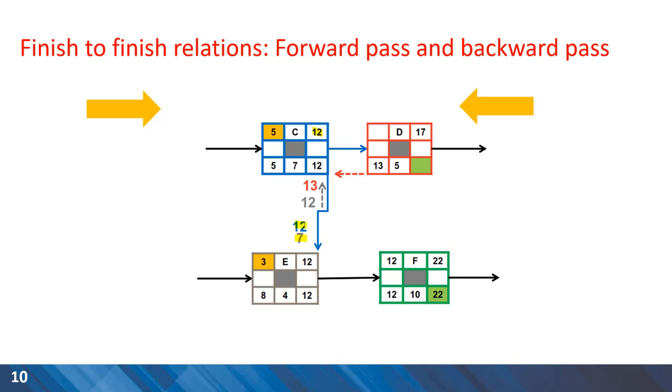Another option that we have is coming from activity C. So early finish time of 12 is our second option for activity E. Because we are in the forward pass, the longest date is accepted. So 12 will be the early finish time for activity E. Again, I encourage you to pause the video and concentrate on the calculations for backward pass.